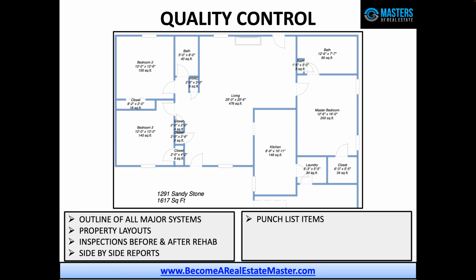You want to make sure you're outlining all of your punch list items and that those things are done, and verifying those are done and done correctly. You find a blotch on the wall where there's a mark or something that needs to be repainted. Sometimes they'll come in and paint one spot and it looks totally different from the rest of the wall, and it's very hard to see in pictures, but in person it's completely obvious, right? Having those eyes on the property from someone that knows what a good and bad renovation is, someone that is expecting a higher end, nice property that isn't going to let you buy on those little minor deficiencies that really affect your sales price at the end of the day.